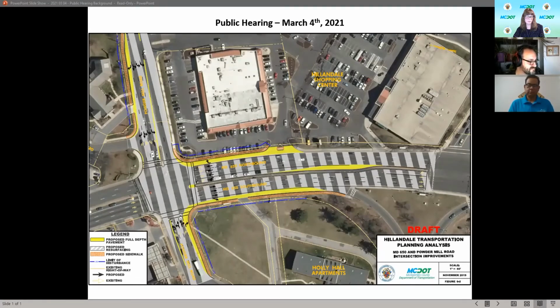Regarding the northbound right turn lane at Powder Mill, since the shopping center property is projected to be redeveloped during the life of the master plan, and the added density is part of this very analysis, the acquisition of this right-of-way should be part of a future development process and acquired at no cost. Paying for this right-of-way, as is suggested in the estimates, would set a dangerous precedent for this LATIP and other pending unified mobility programs. The second item is the extended southbound right turn lane from Powder Mill to 495 West.